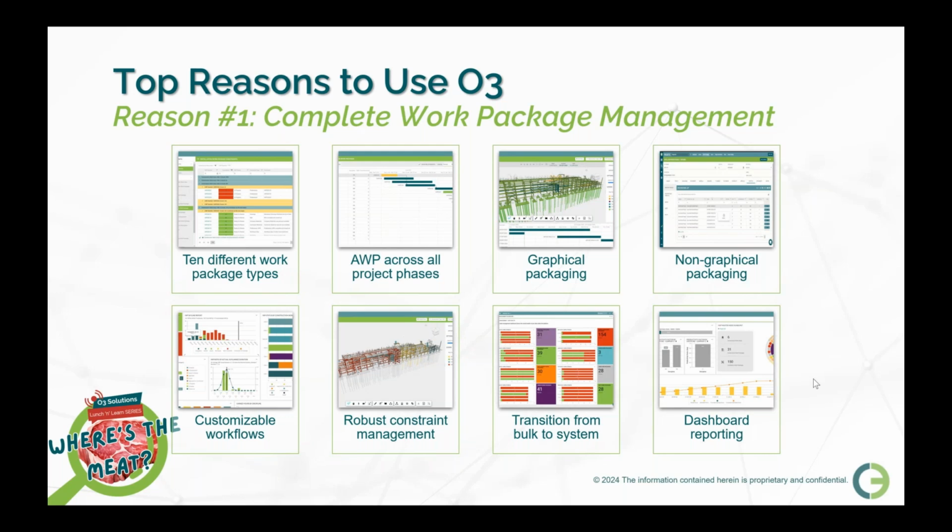Nowadays, it's all done digitally, so I can assign it to the next person in the flow. They can review it, mark it up, make changes, make comments, send it to the next person in the flow for approval. If you need to give it to the owner or the engineer or whoever needs to see it, and then it gets closed out. And then I can move into my constraint management process, where as a planner, I am